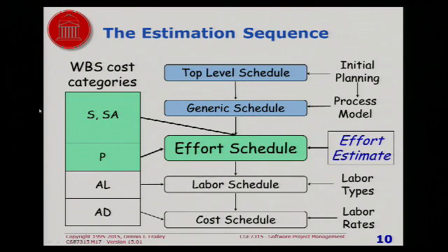So that's the generic schedule. And all it does is represent the process and the life cycle in terms of what percentage of the work is being done each month or each week or whatever of the project.